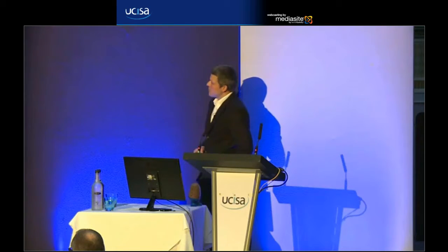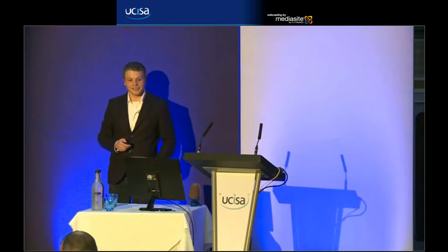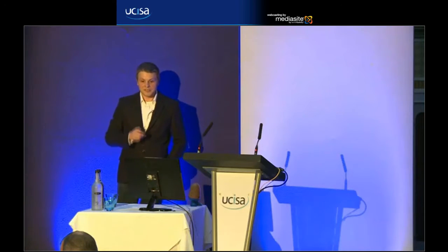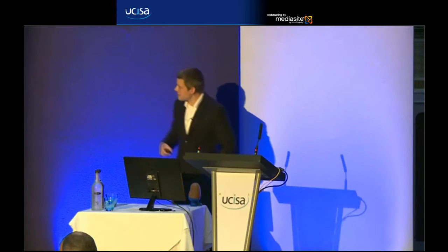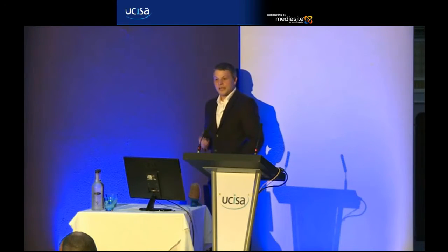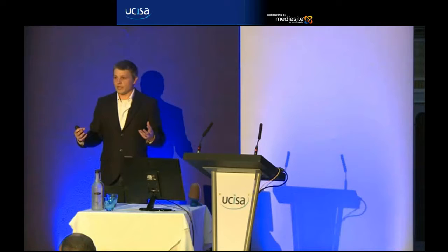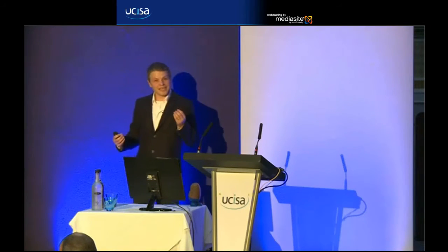We've also got the daily scrum there. Every day we have a scrum. This is a stand-up meeting, which is 10 to 15 minutes. We ask 3 questions of the developers. What did you do yesterday? What are you going to do today? And are there any problems or issues? And these 3 questions have to be very quickly answered. And it's just to aid that communication.